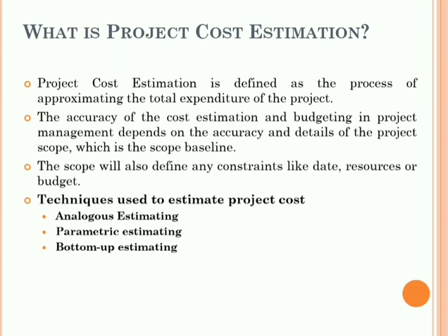The project budgeting is performed in parallel with the project scheduling process. It is highly dependent on three components: cost estimation, task duration, and allocated resources. Okay, during the project budgeting and costing, the project managers communicate with different people. They are responsible for managing the work efforts as well as estimating the project cost. Here, we will use the various project inputs, like the work breakdown structure of the project, the cost estimates of the project, historical data and records, resource information, and policies.